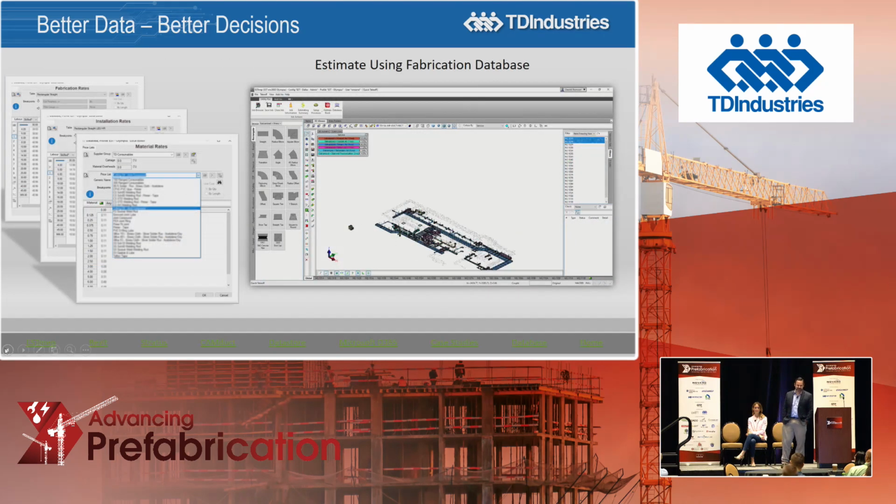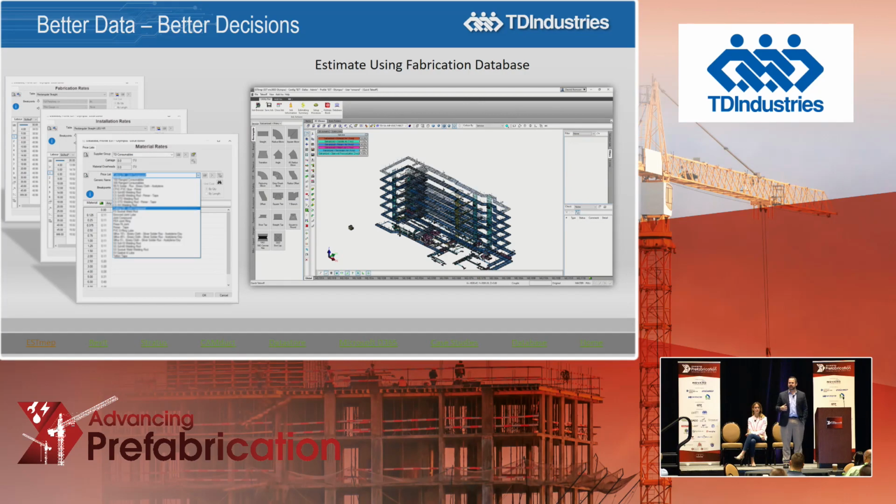All right, so this is EST, okay? So as they're tracing over the PDFs, it's creating this model, okay? And you'll see we've got labor rates, material costs, all the things that are relevant to pre-construction. But what also is in there is information that they're not using. They're not necessarily using seams, notches, connectors, things like that, but it's in there already. It's natively in there. This is the same data that we're going to manufacture off of. This is the same data we're going to do our detailing off of. So again, driving the entire ecosystem from that same core data is what's important.